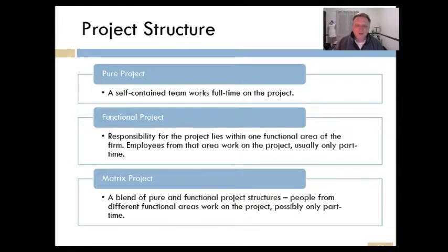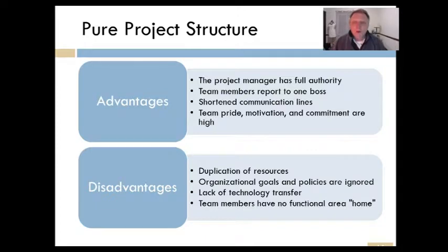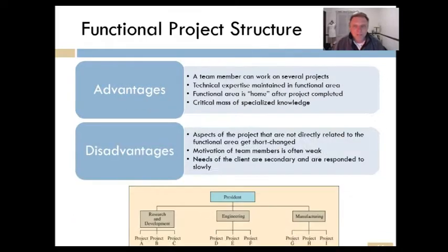People from different functional areas work on the project, probably on a part-time basis, but could be on a full-time basis too. Pure project, some of the advantages of it: project managers have full authority to make sure the project gets done, which is pretty cool when you think about it. There's no split leadership. One of the disadvantages, though, is it can duplicate resources. So imagine almost like separate silos, like growing up in your company, each silo working on its own project with a lot of duplicate resources, people doing the same things but in different projects. Can be wasteful.